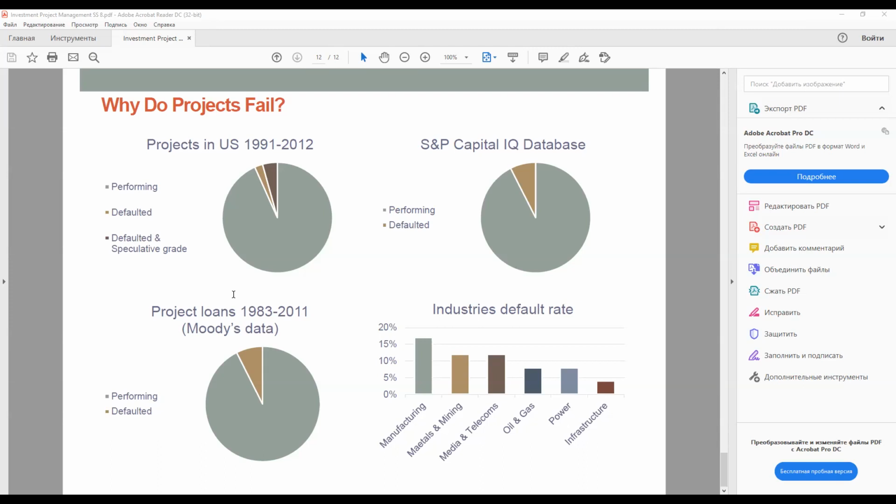Other reasons for failure, besides those listed by S&P in the slide, would include sponsors' inability to raise finance, for example, because the terms of the project agreement or the cash flow make the project unbankable. Low-ball bids by sponsors, especially if there are construction contractors, which assume that in due course extra cost claims against the off-taker or contracting authority will make the project viable.